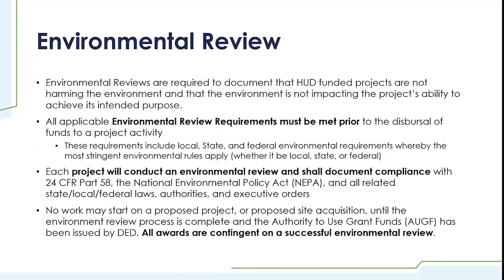The National Environmental Policy Act requires each project funded with federal dollars to undergo a review to determine impacts, both positive and negative, on the environment. It's a series of steps that force an evaluation and thought process that will ultimately identify impacts through each action and activity that's proposed under the project.